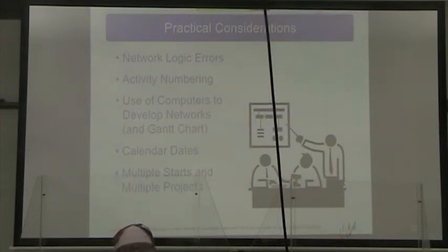What are the calendar dates, right? Are all weeks equal and all days equal? Oh, no. For example, if our project runs through Thanksgiving or Christmas, how many days are we going to lose to assorted holiday fooling around? We're going to lose a lot.